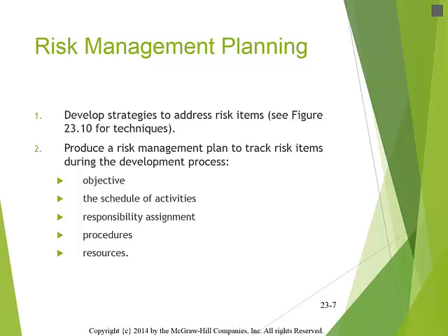After identifying the strategies to manage each high priority risk, a risk management plan is developed. The plan specifies for each risk the objective, a schedule of activities to be performed, who will be responsible for performing the activities, and the resources to carry out the plan.